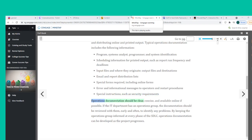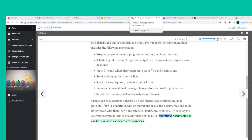Operations documentation should be clear, concise, and available online if possible. If the IT department has an operations group, the documentation should be reviewed with them early and often to identify any problems. By keeping the operations group informed at every phase of the SDLC, operations documentation can be developed as the project progresses.